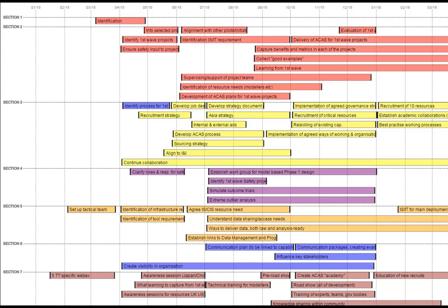Projects sometimes fail or don't meet expectations because there's a mismatch in the information in the project management system with the information that's provided to stakeholders. Manually pulling out that information is time-consuming and unnecessary. If we can bring that information from the planning system directly into this format, the team and stakeholders can be assured that information is current and is the real planning information used by the team.